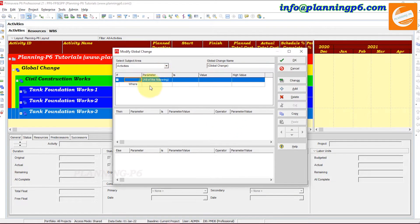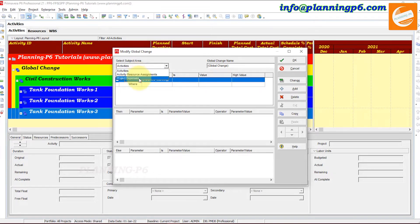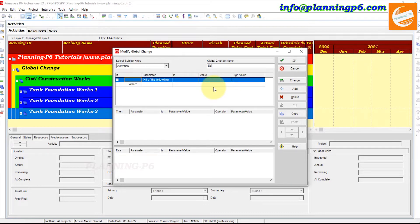When you add a new Global Change, a wizard appears. First, you select the subject area carefully — Activity, Resource Assignment, or Project Expenses. We will start with Activities. You can write a name for the change. There are three main sections: If, Then, and Else. In the 'If' section you select the filter conditions.